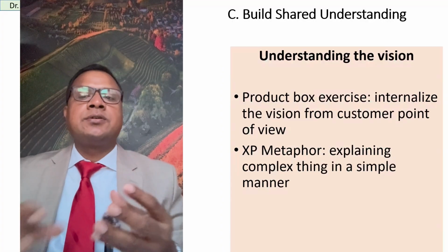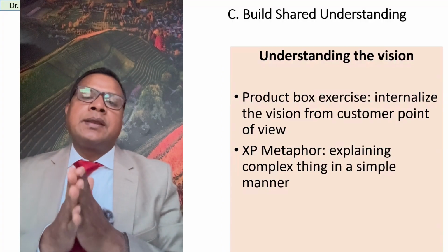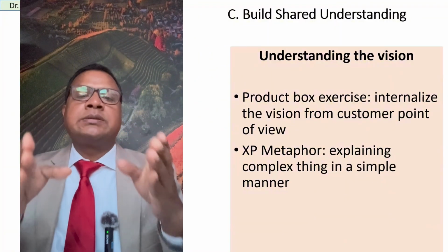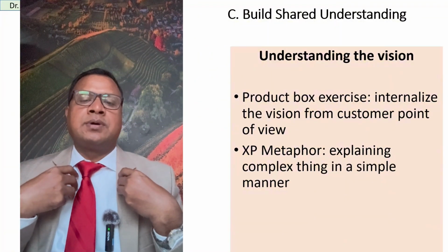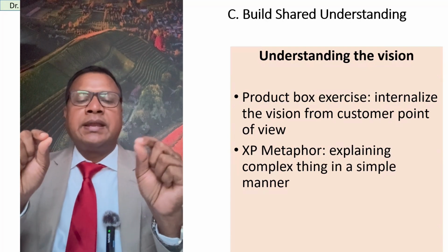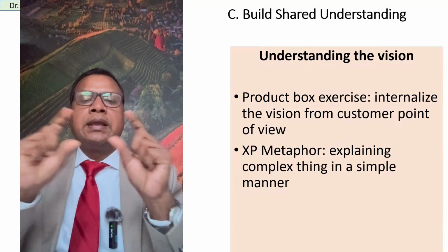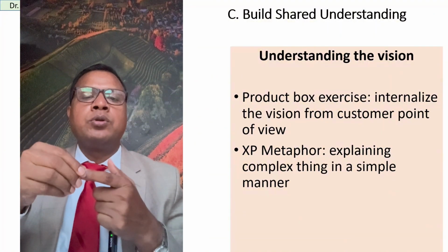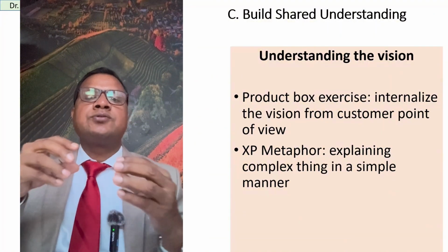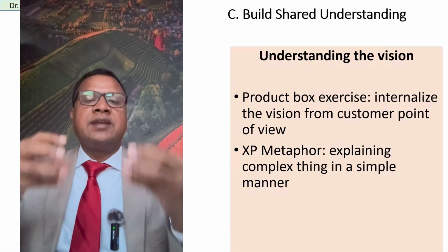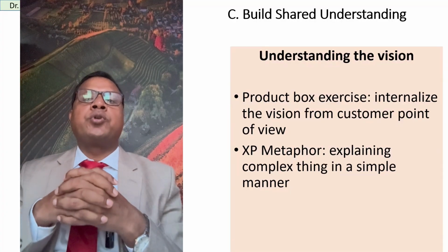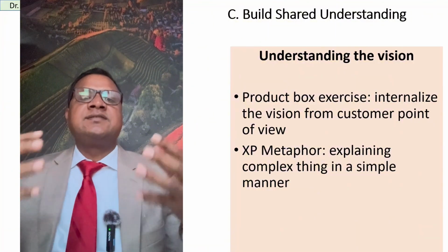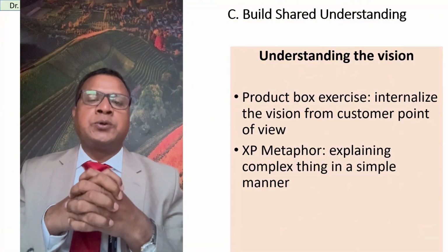So to understand the vision, everyone can do some kind of exercise like the product box exercise. For example, if I am a customer, and you give me a product and I'm reviewing this product, what I have liked, what I want more, what features are missing. So from a customer point of view, when I give feedback, this is called the product box exercise. This kind of exercise can enhance the relationship between the stakeholders.